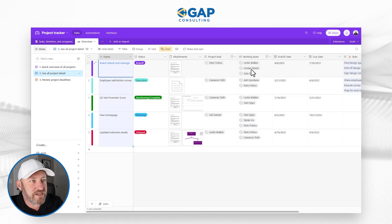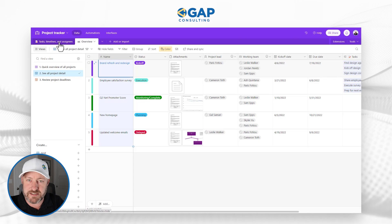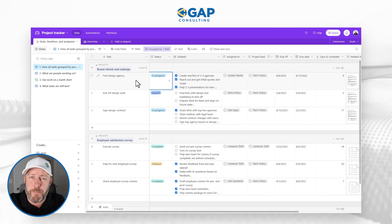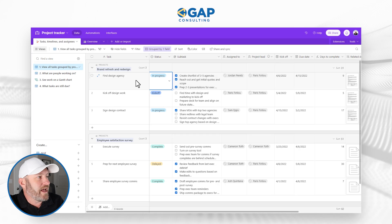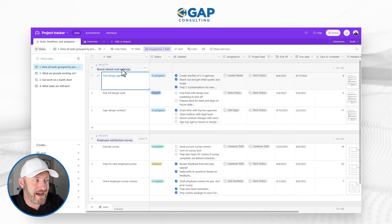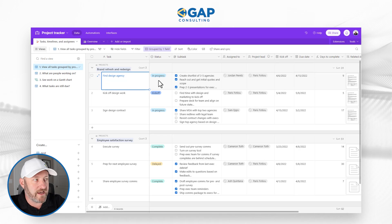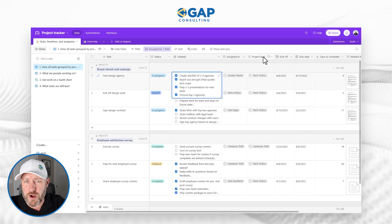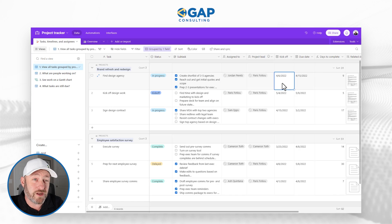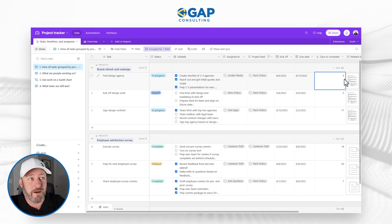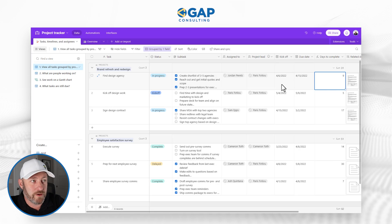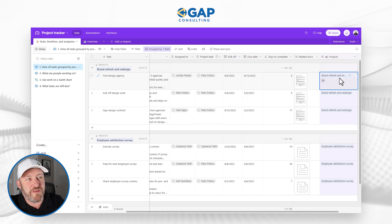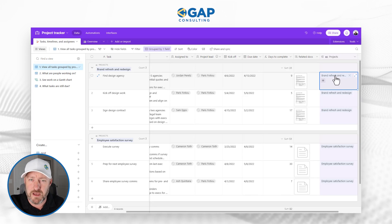An important thing to note is that a project links to tasks, which is our second table. Tasks are the components that make up a project. For the project 'Brand Refresh and Redesign,' for example, we have three different tasks. We can track the status of tasks, look at subtasks, see who tasks are assigned to, who the project lead is, kickoff and due dates, how many days are being used up via a formula, and stored documents. A task links back to a project, so that's the linked relationship in our back end.